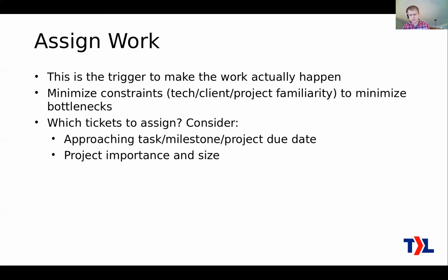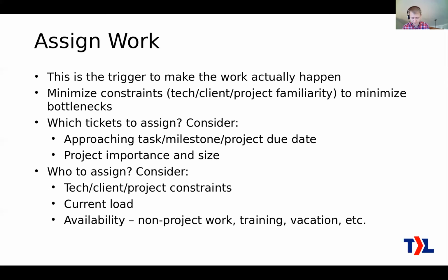Okay, so if you're thinking about which tickets to assign, you think about how this project actually fits together. What work needs to be done first? Also, consider multiple projects, because you're an MSP, so you're doing multiple projects at once. Does any one of these projects have a due date that's coming up sooner compared to the other ones? Okay, that's work that you need to prioritize over the other projects. Also just the size of the project and how important it is. Okay, so those are what you're going to consider as you decide which work you need to assign.